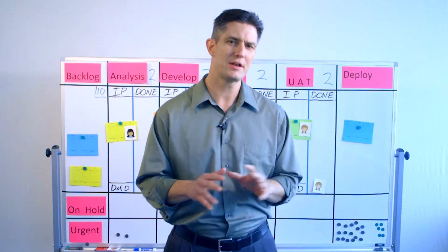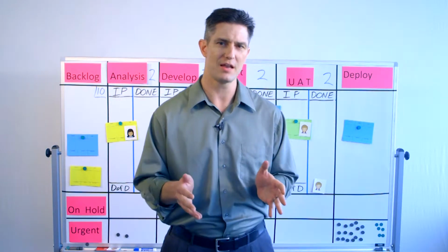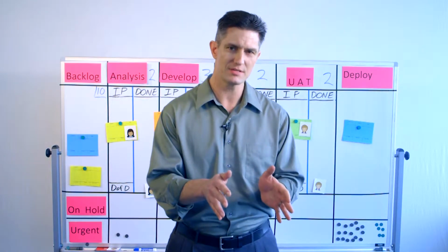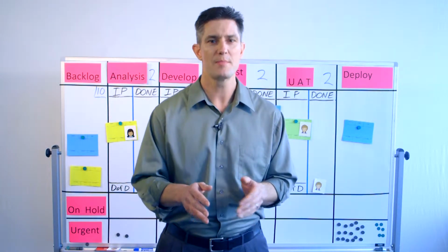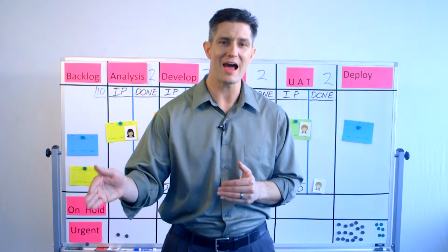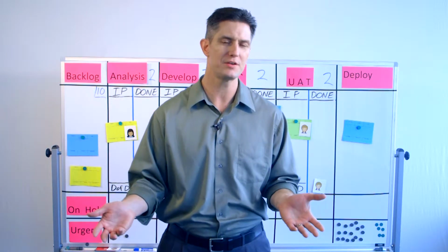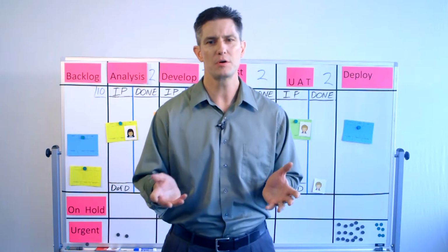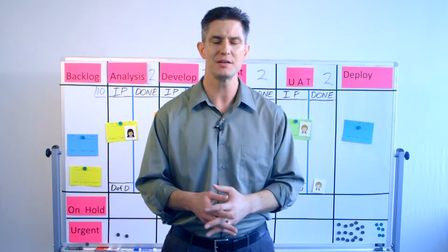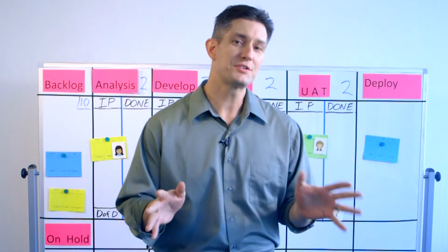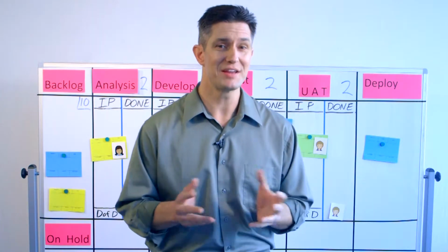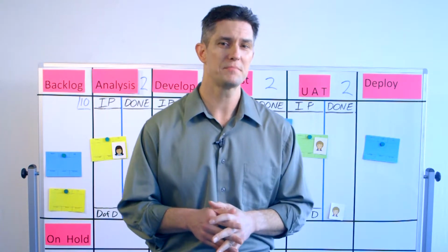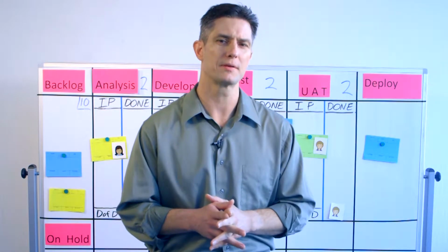Now, I like to schedule anywhere from 30 minutes to an hour for the stand-up, knowing that the first 15 minutes, the team will engage in the stand-up, but then have planned time right after to sit down and work through any hot issues, make collaboration plans, get clarification on any stories, or show any work in process to get ideas or approval. It's understood that if a team member doesn't need to be involved in the after meeting, they can go back to their desks and get to work.